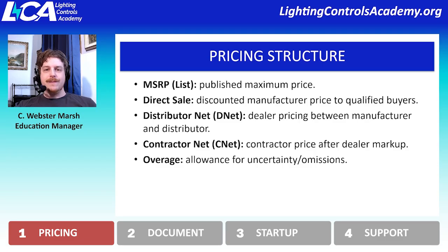And so a lot of, for instance, manufacturers reps will use overage as a way of covering startup services for their technicians. So it's a fluid number, and it can get quite tricky to pin down exactly how much overage is going to be put on a project. But it's a common practice with most lighting control systems that there's going to be some level of overage to cover unexpecteds or technician work or additional labor that isn't necessarily listed out someplace.